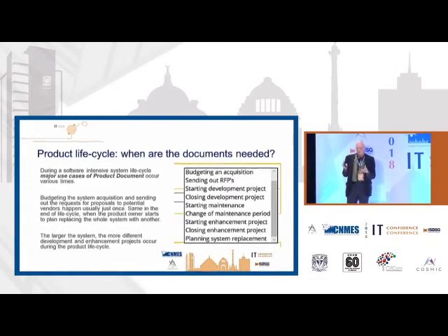And then the other, when we are changing maintenance period, we are using that in Finland quite often, that every year, in the end of the year, we check the size of the software for the budget for next year maintenance. And that's useful to have good documentation, what is done during the year. If that's completely lost, it's very difficult to improve the budget for next year.